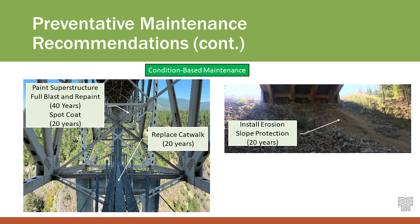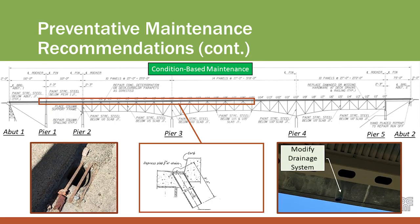The big item, as Greg talked about, was the paint. We narrowed it down to essentially two paint strategies: one is a full blast and repaint with an assumed 40-year life, and the second is a spot coat with an assumed 20-year life. These lifespans are for planning purposes; throughout the life of the bridge there would be inspections to verify them. In addition, we need to address the drainage — if we're going to fix the paint, we need to fix the drainage. We want to collect the water, reroute it, and discharge it somewhere it won't cause problems anymore.